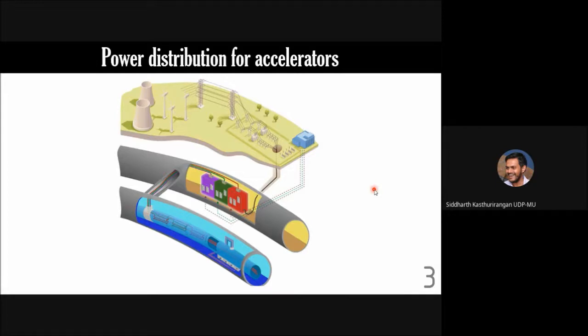Then the main switch etc. cannot be in that place. Then is there some part where there is a high voltage supply as part of the accelerator? Then again, it doesn't make sense to have the switchboard etc. close to that. This is just the switchboard related things. Where do you want to place things? All of these things have to be planned very carefully.